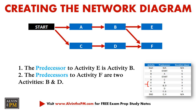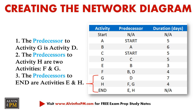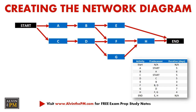For the last and final rows in the table, the predecessor to activity G is activity D. The predecessors to activity H are two activities: F and G. And lastly, the predecessors to End are activities E and H. After you make these updates, we now have the final completed diagram as shown on the screen.